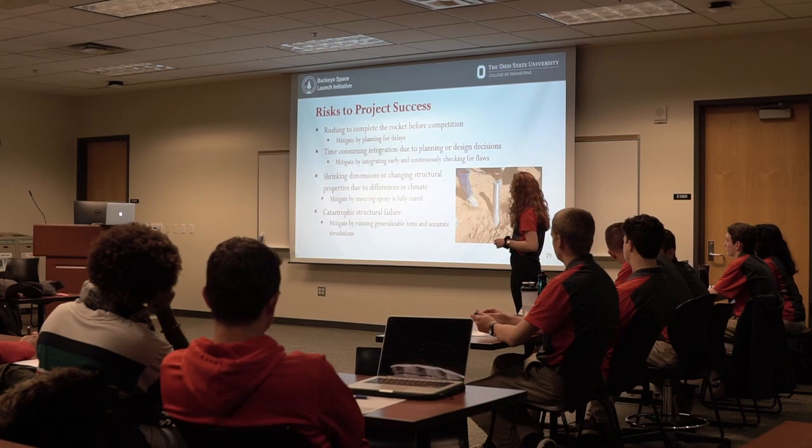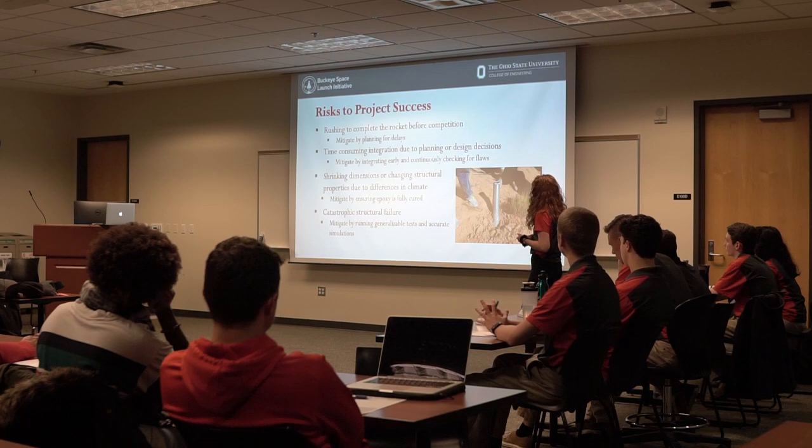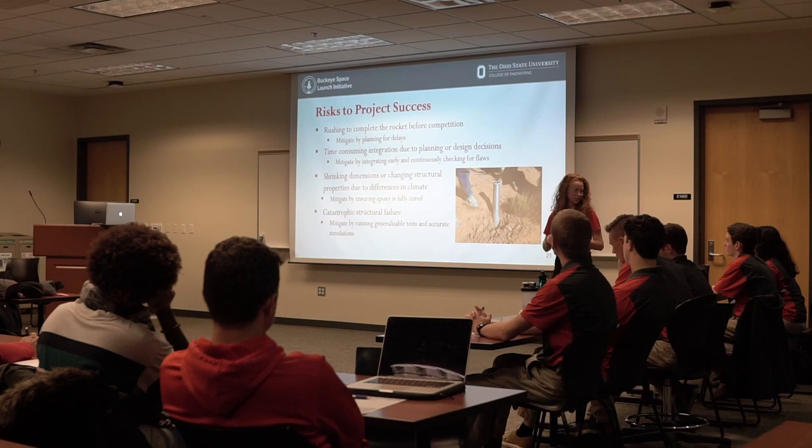That and kind of getting everything together and realizing something's not going to work. So again, mitigate by integrating early and having time. And also continuously evaluating our SOLIDWORKS files and our design, checking for errors before we start building.